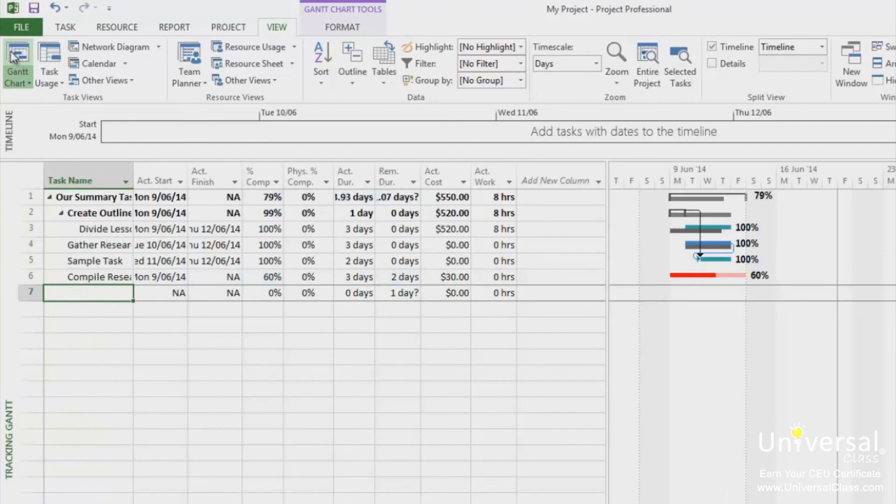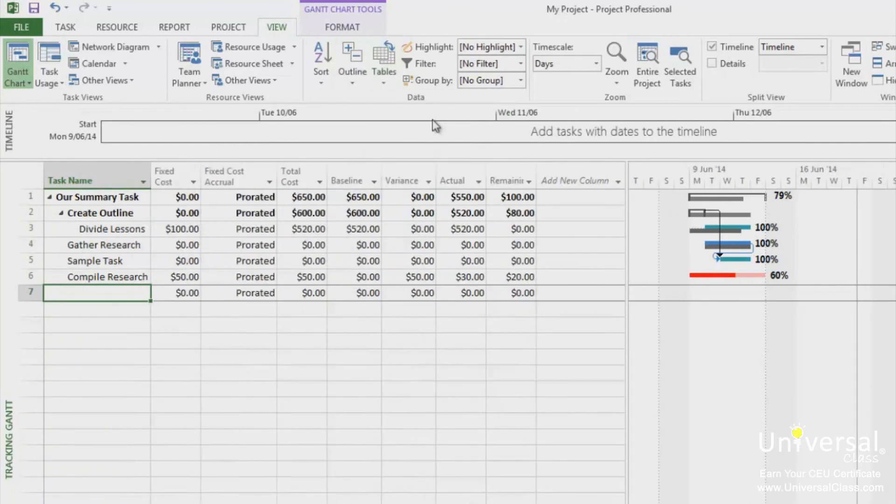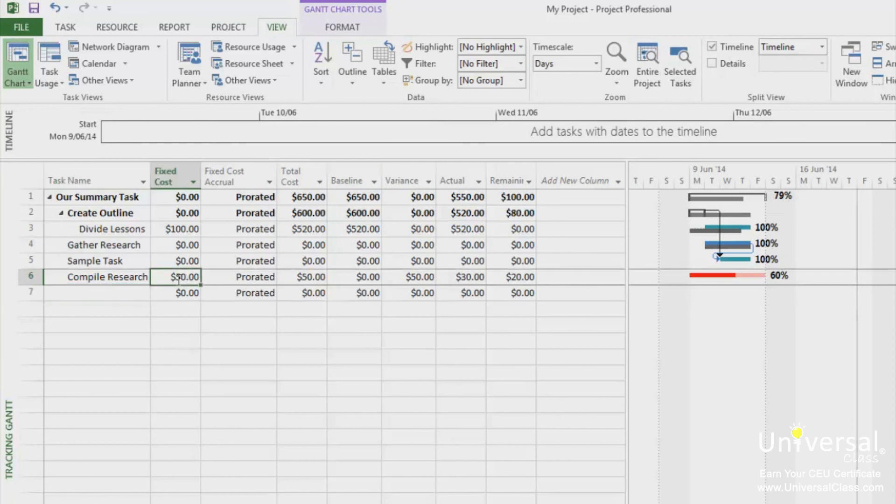Go to the View tab and under the Tables drop-down, select Cost. You'll then see the Cost table. Go to the Fixed Cost column for the task you need to update, then type in the Fixed Cost. You can even enter in several Fixed Costs. It's that easy.